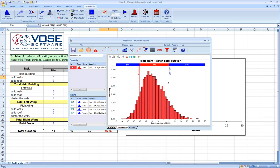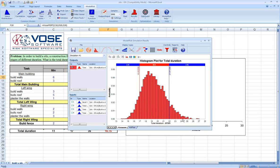One thing to note if we look at this graphically is that the right-hand tail, the tail that represents the possibility of having a longer duration for the project, seems to be pretty long or longer than the left-hand tail.